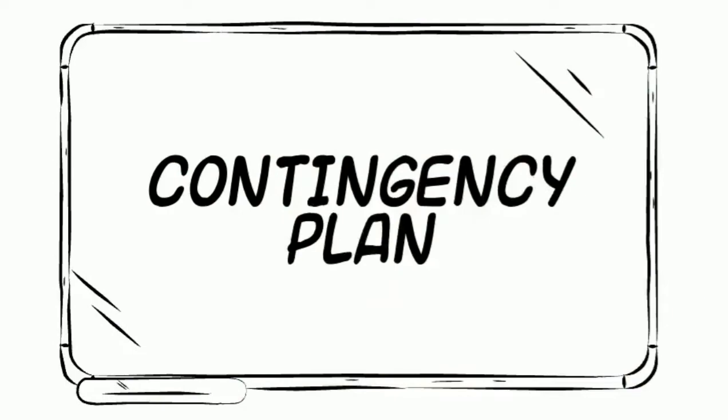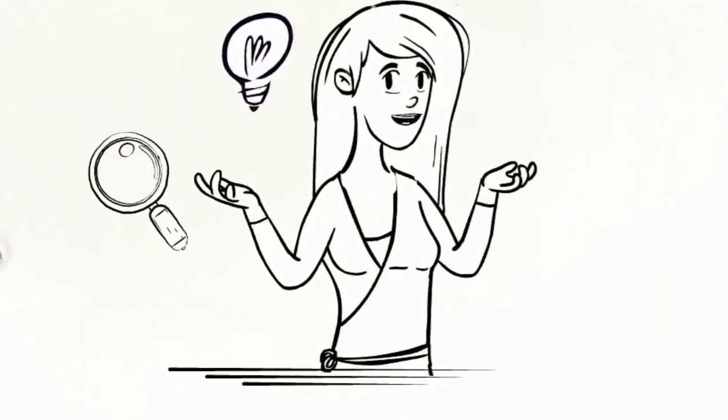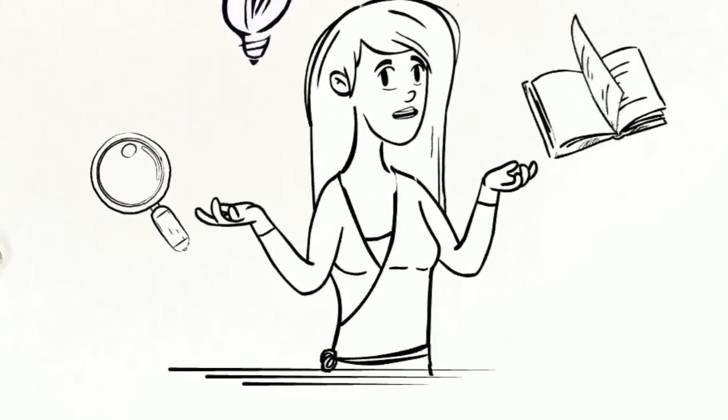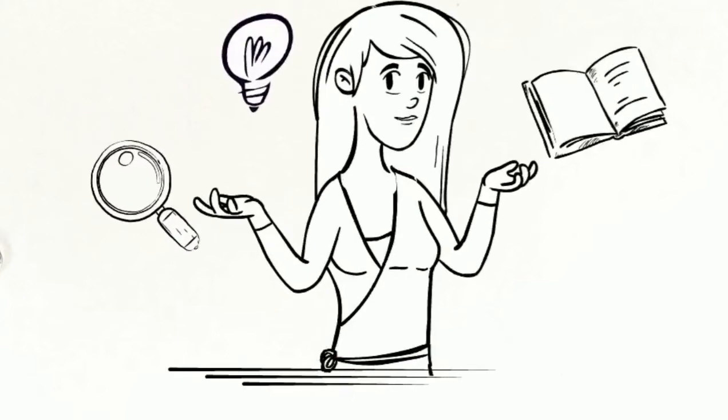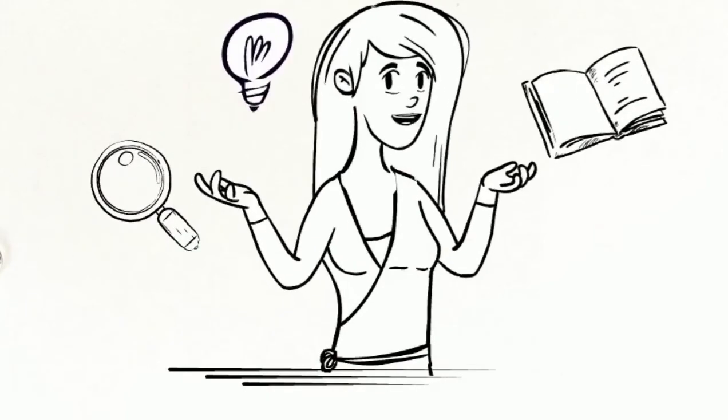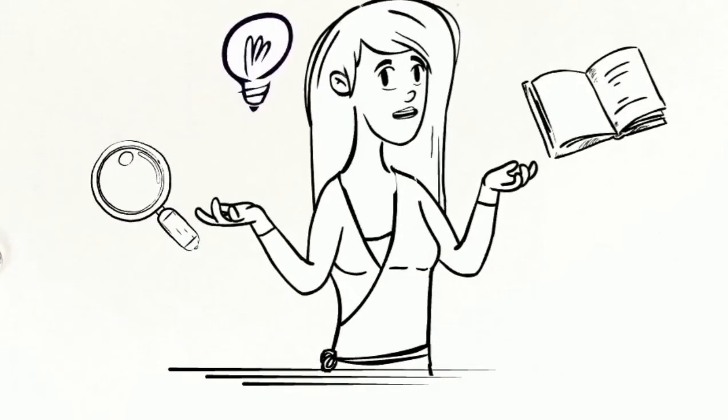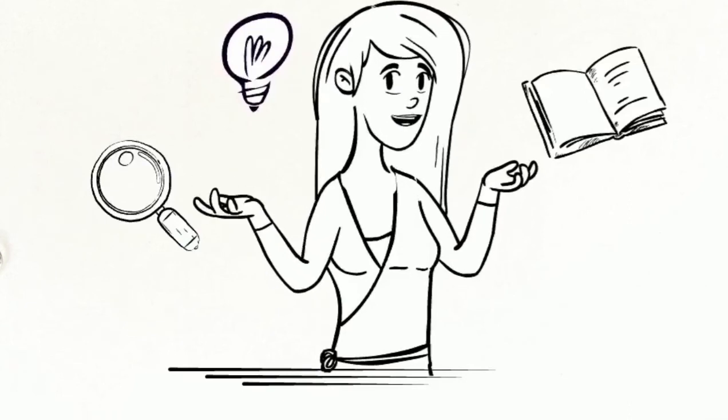Contingency plan. Determine not only what will be done if the problem arises, but also what event will trigger the contingency plan. In times of stress, quick thinking is vital, but programmed thought and action is much better.